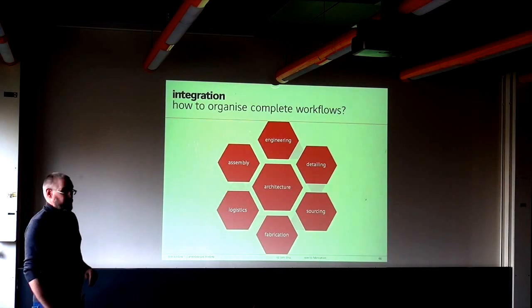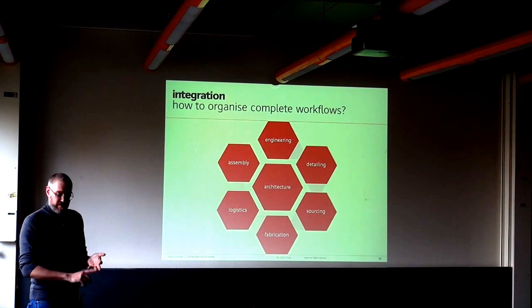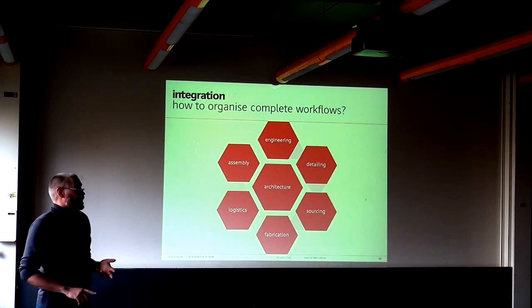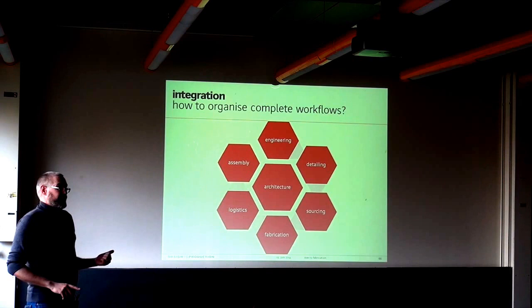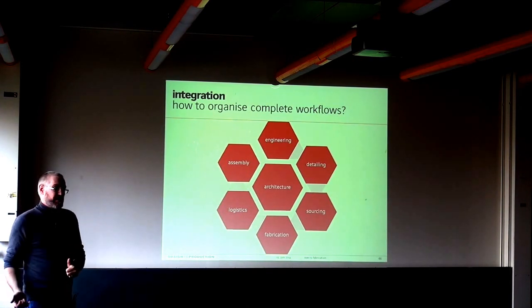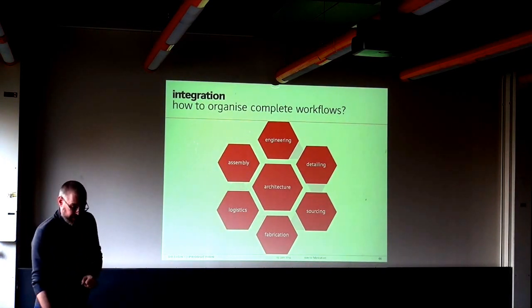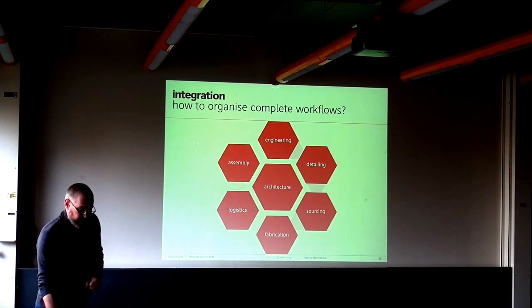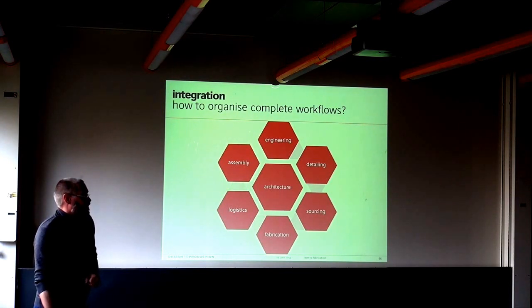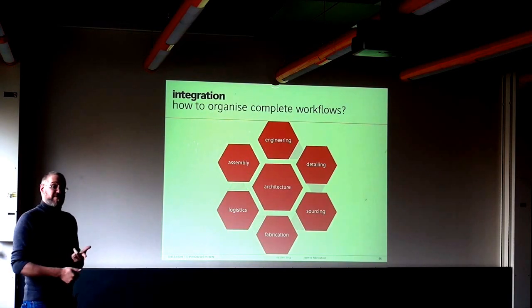And of course, you have to actually organize the complete workflow. So engineering, detailing, sourcing, fabrication, logistics, assembly. If you look at only one point there and you optimize this one point, you may very well worsen all the other points. You have to look at the whole thing at once to find out. And you have to have the tools to do that also, which means we're sometimes actually taking tools from the software industry in terms of issue management and tracking systems to get this process done.